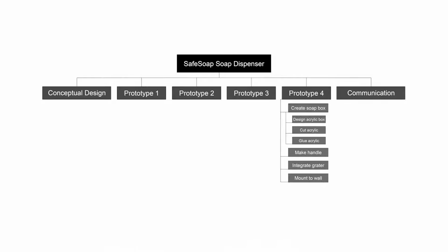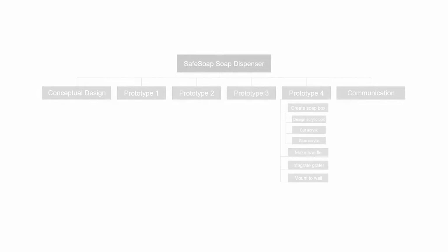Each of these decomposed subtasks cannot reasonably be broken down any further and can easily be assigned to one person to work on. We will continue this decomposition process until all of the deliverables and the work required to produce these deliverables are covered in the work breakdown structure. From these examples, it's clear that work breakdown structures can have many different forms. However, every example decomposes a project in a hierarchical way.